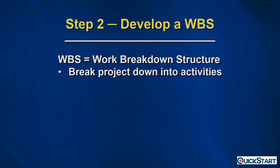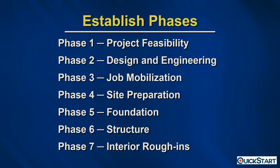Step two is to develop a WBS — Work Breakdown Structure. In essence, you take that big project and break it down into finite activities. The first thing you do is take your project and create phases. Maybe our project is to build a house — a construction project. I've created seven different high-level phases as the first level of the work breakdown structure.